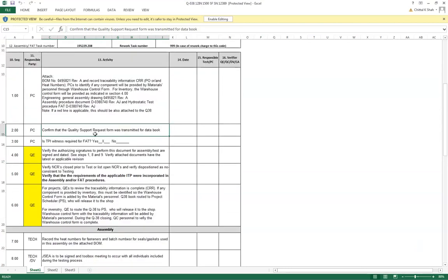Make sure that while you're building it, you also send a request to Databook that you need to start the Databook. So Databook starts pulling information while you start building it. That way, when it ends, you can usually finish the Databook in a couple of days. What used to happen is we'd ship something, and two months later we'd work on the Databooks, and things had transpired by then. So this helps us get them kick-started while we're finishing stuff.